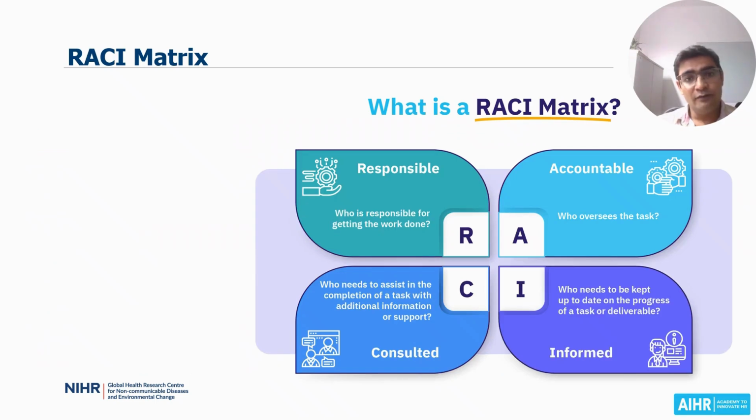Now that you have finalized the number of people needed and recruited them, the next step is to clearly assign who is responsible for each subtask. To make roles and responsibilities even clearer and stronger, we will use a tool called the RACI matrix. The RACI model is a quick way to lay out the roles and responsibilities on your project. It allows you to discuss, communicate and agree upon roles for your project.